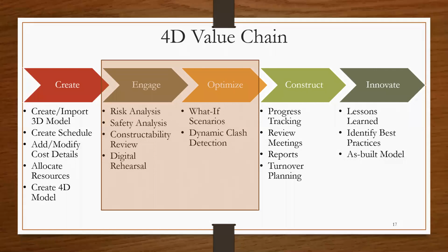The next stage is the engage stage. It's at this stage that with the model you have already developed, you do your risk analysis, you do your safety analysis, you begin to do your constructability reviews, and begin to do your digital rehearsals.